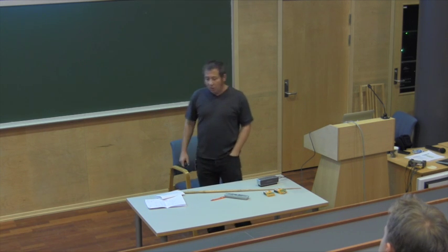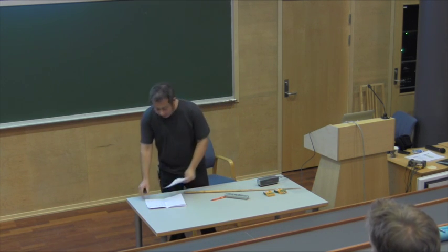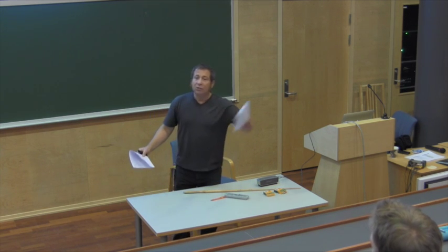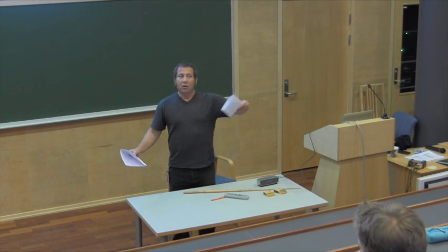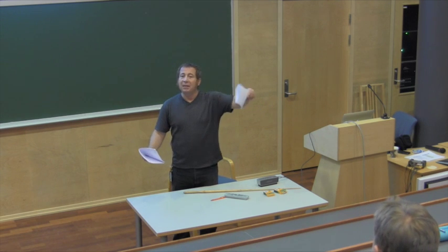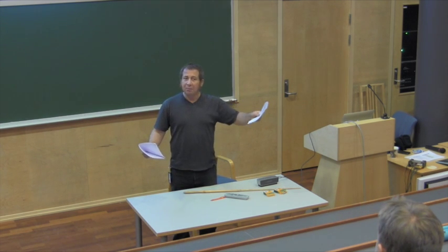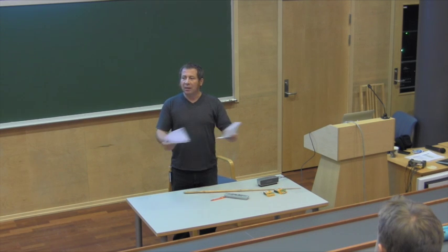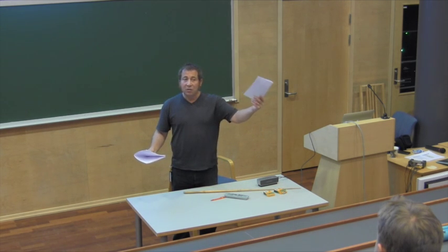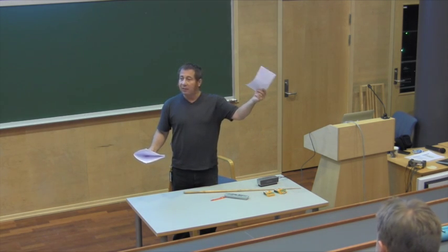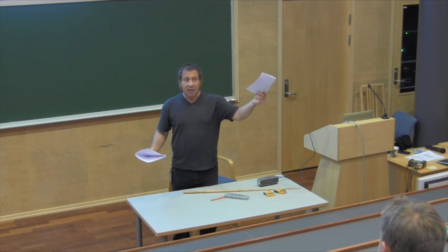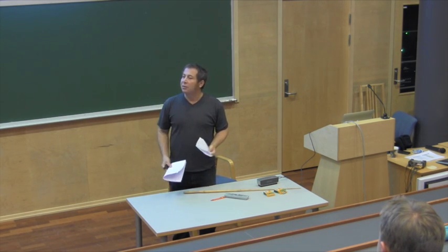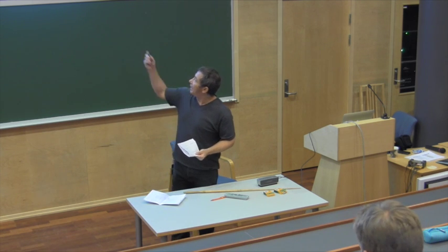In this analog or comparative model, we have a new project we are producing, and then we look into our database. We look for similar projects. Not exactly the same, but at least similar. And then we start comparing these two with each other. And then we use the base project, or the source project, as a reference when we develop the new estimate for this new project. This is called comparative.